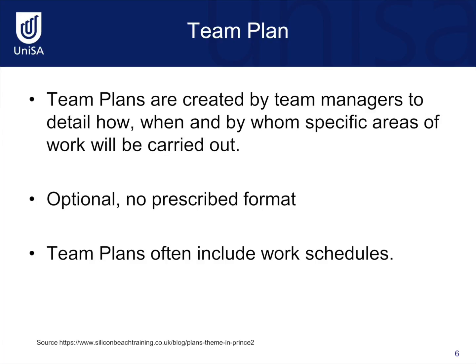Team plans provide another level of granularity in a project. They are optional and therefore not necessarily created for every project. Why are team plans not necessarily created for every project? Well, teams may not exist due to the nature and or size of the project, and therefore team plans are not necessary. There is no prescribed format for a team plan, and team plans are created by team managers to provide more detail on what needs to be done within a stage, how it needs to be done, what the work packages are, what the work schedules are, and who is accountable for doing the work within prescribed timeframes.